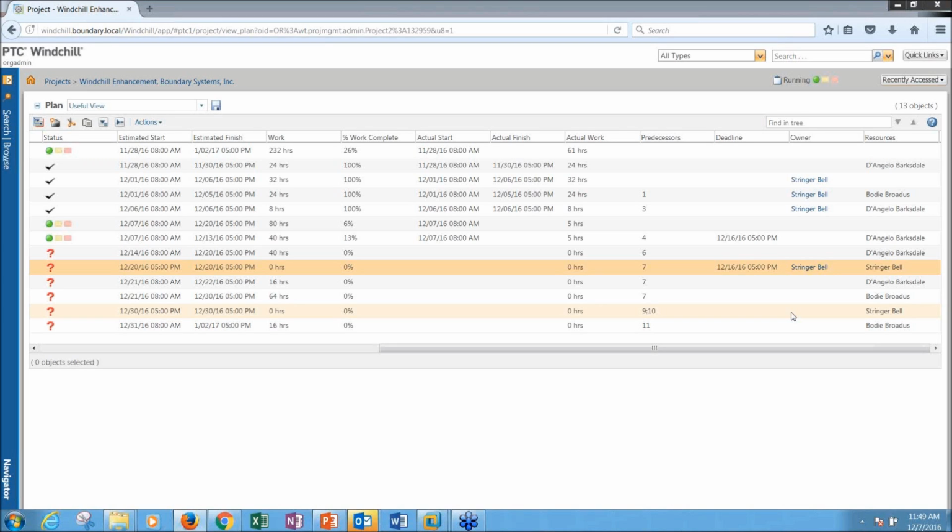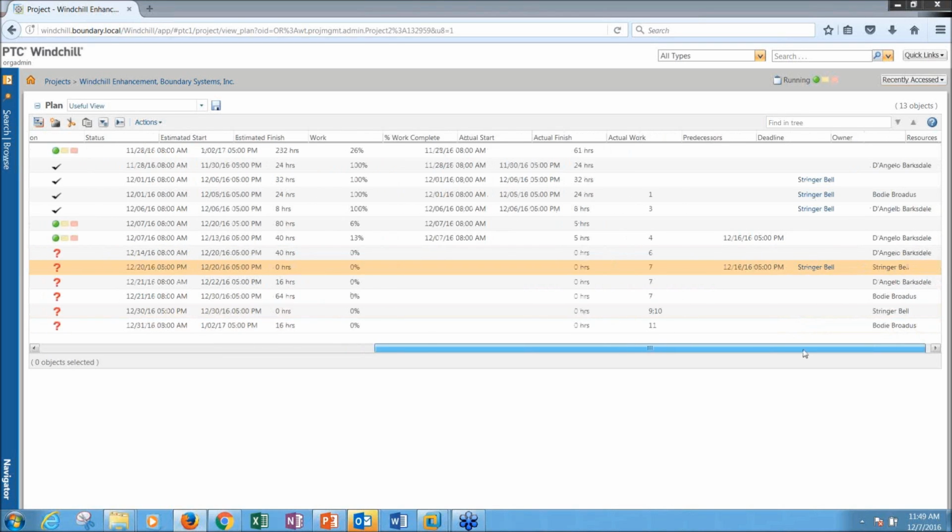So that allows me to distribute control of the plan amongst multiple people. If we have different sections, we have to do a CAD design, and then a tool design for our product, and then manufacturing. Different people are experts in those different areas, so I can assign different owners to those sections of the plan, and then they become the project manager of their subsection. The resource is who's actually going to complete that.